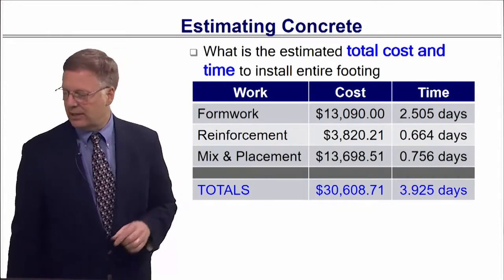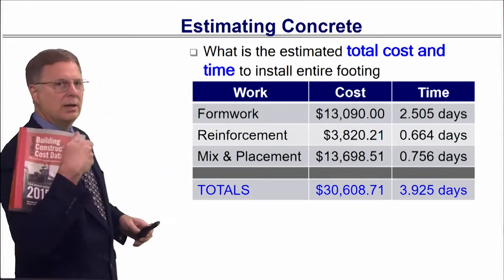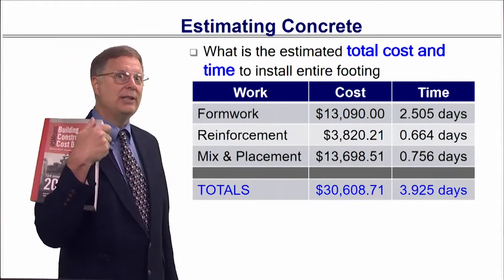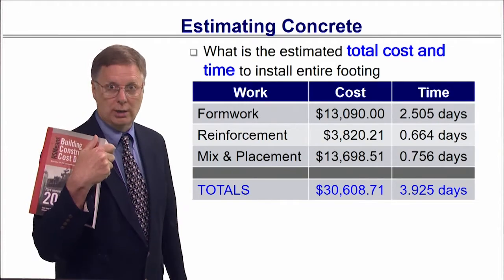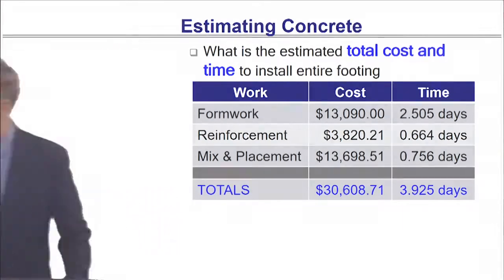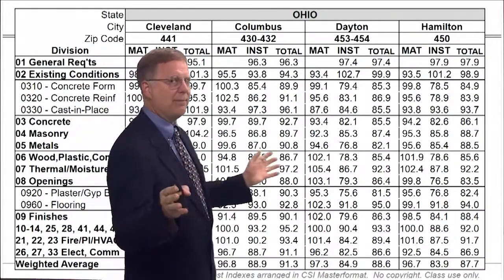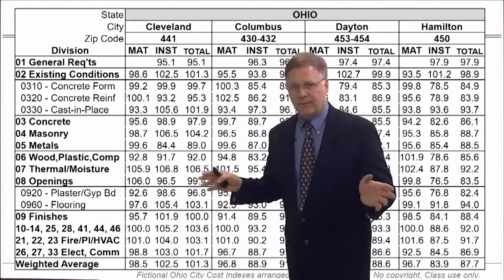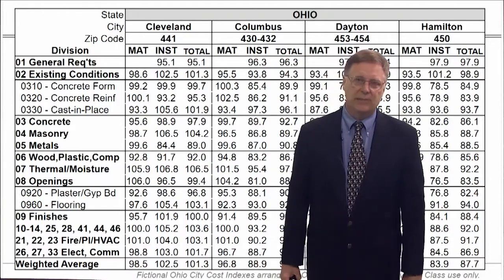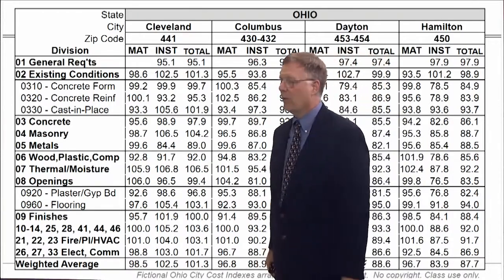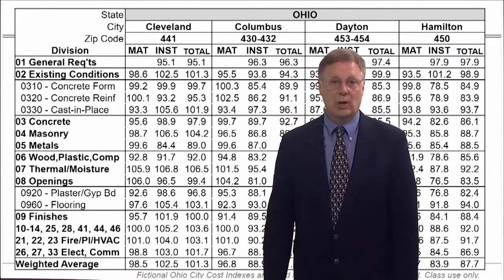And in this case, the area cost factor needs to come out of the same book. We can't use the assembly's area cost factors. They don't work. We'll see that on this next chart. All right, let's take it to Wright-Patterson Air Force Base. This is a snapshot of, again, I've changed some of the numbers around, but this is exactly what the RS Means depicts in its city cost indexes for the area cost factors for a unit price cost estimate.